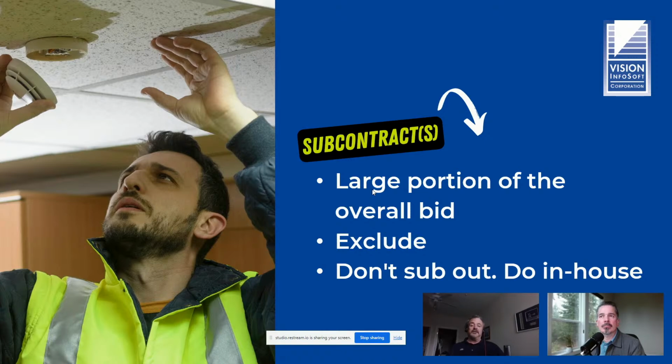The opposite of that is to not sub it out to somebody else. Do it in-house. If you have the capability of doing the fire alarm or the data, that portion of the job, rather than sub it out, do it in-house. At least you have control. You may not be as competitive or efficient at it as another subcontractor, but you're in control if you're doing it in-house. So there's a couple of options when you've got a large subcontract bid: just exclude it altogether or do it in-house.